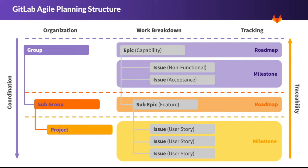Here we have an overview of how the different components of GitLab could map to an organization. It's possible to use a single group to encompass an entire org, and then use subgroups for each division or business unit, which then encapsulate the individual projects. Epics give product owners and leaders the ability to link and manage work over an extended period of time. An epic can span groups and projects, and it makes it easier to manage the overall flow and priority of work. Tracking progress via epic roadmaps can be simpler and more accurate than tracking based on individual stories or milestones.